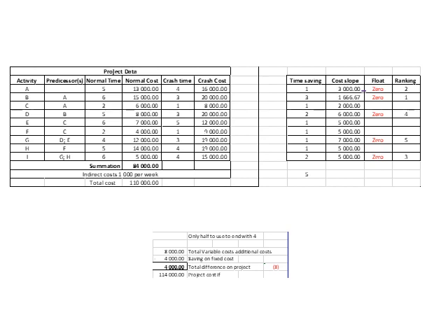So if you've established your cost slopes, you can start ranking your items. So this is what we basically indicated here. You will see here I also indicated that there's zero float on these items. If they fall behind, the project falls behind. So very important to note that.